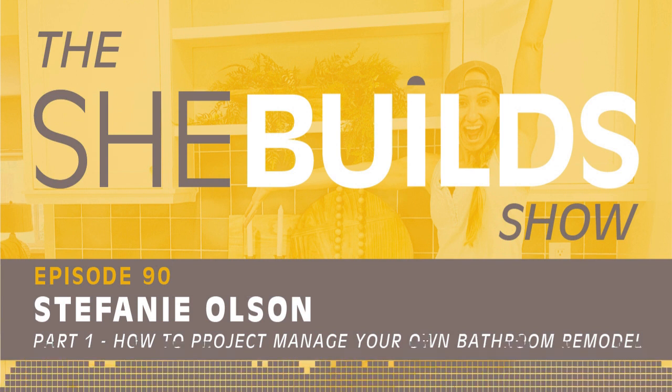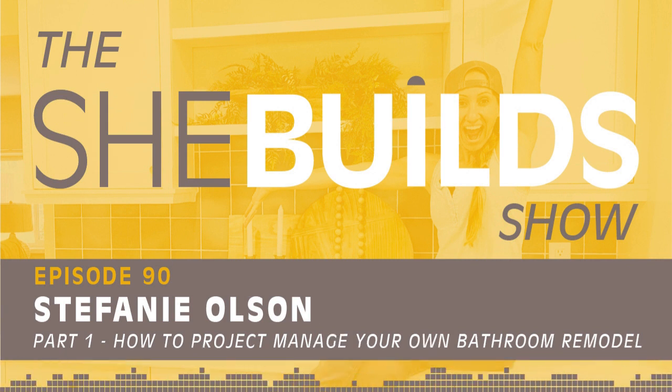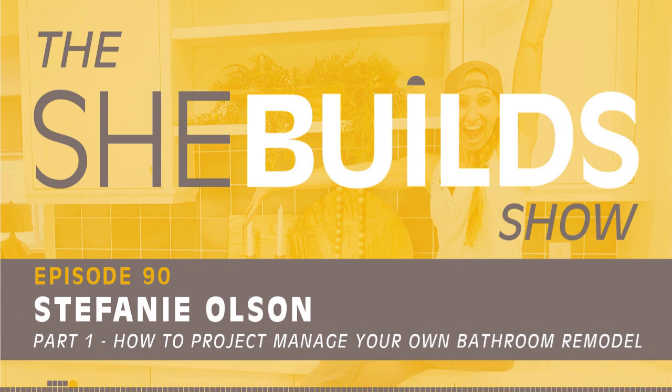So you need to know your tile. You need to know the list of everything that I just listed: your tile, your countertops, your cabinets, your sink, your faucets, your lighting, your paint colors, absolutely everything, down to the grout and the trim around your shower. You need to know absolutely everything before you even think about calling one person, because that's the first thing they're going to ask you. So after you've done that, you have your floor plan, you have it drawn out, you have your design.